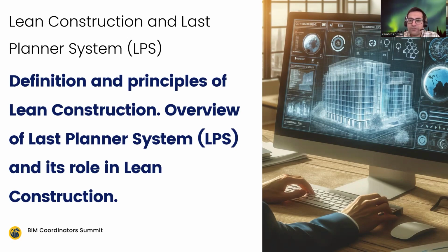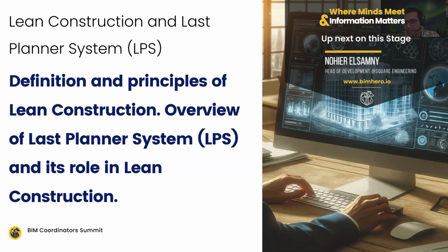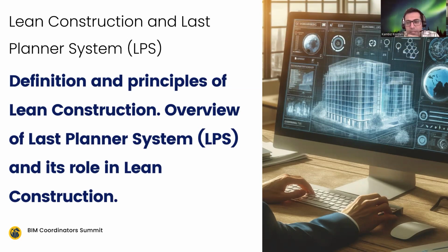By encouraging frontline workers, those who directly oversee and engage in construction activities, to participate in the planning process, the last planner system ensures that plans are realistic and grounded in the capabilities of the job sites. This involvement increases commitment to the plan and enhances accountability among all the stakeholders, from project manager to tradespersons.